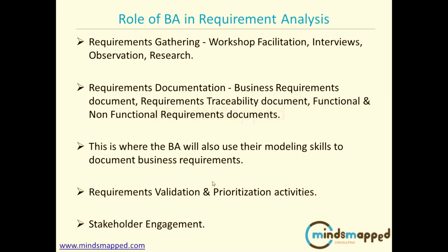If the client wants this login screen to go in the very first release, right? Until the login screen is there, we cannot get into the system. So that is of number one priority. So we have to prioritize each and every requirement at this time. And you have to engage your stakeholders with your competencies, in how you are managing your stakeholders.